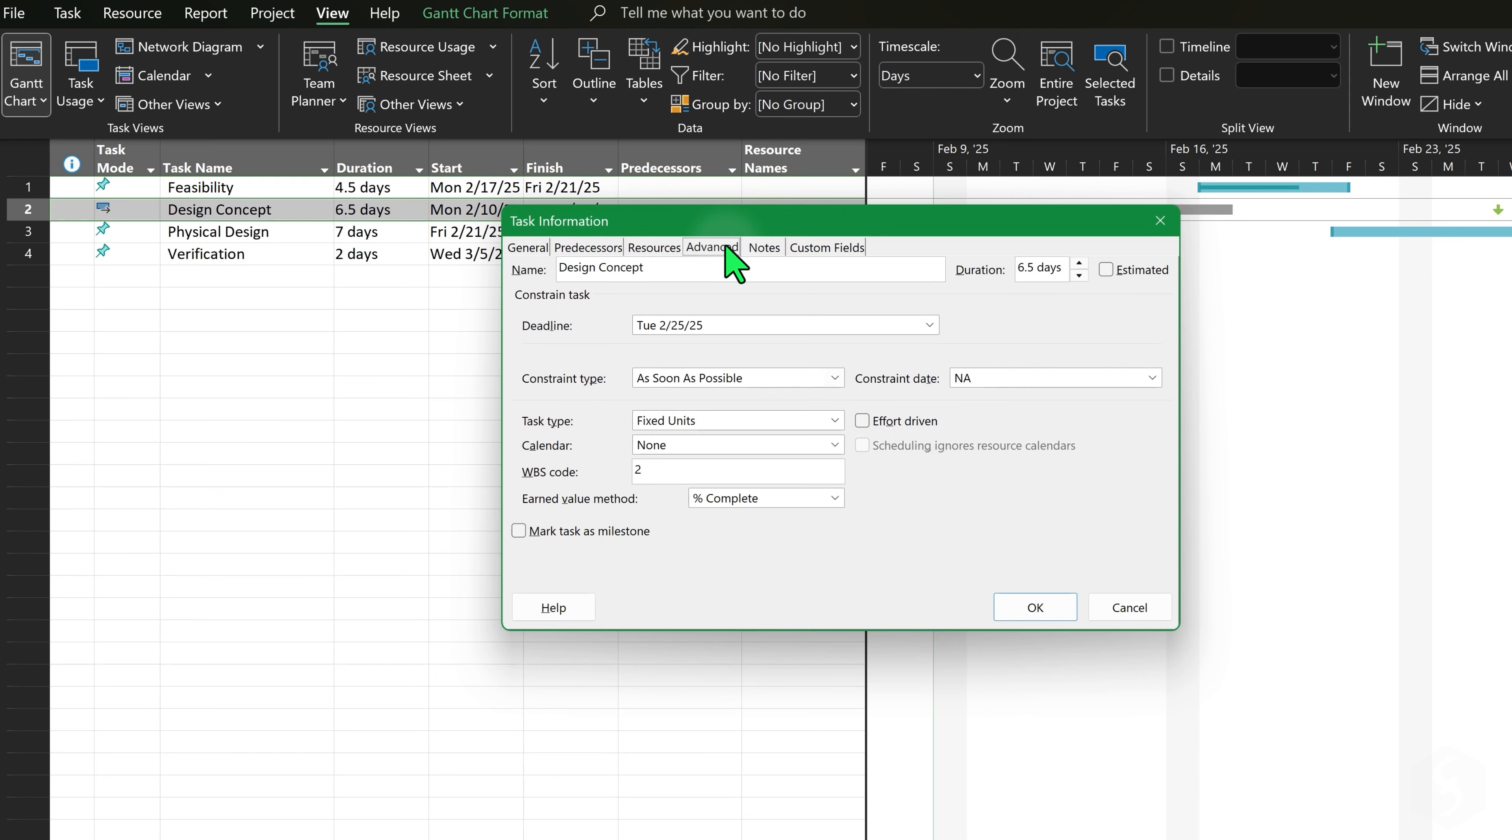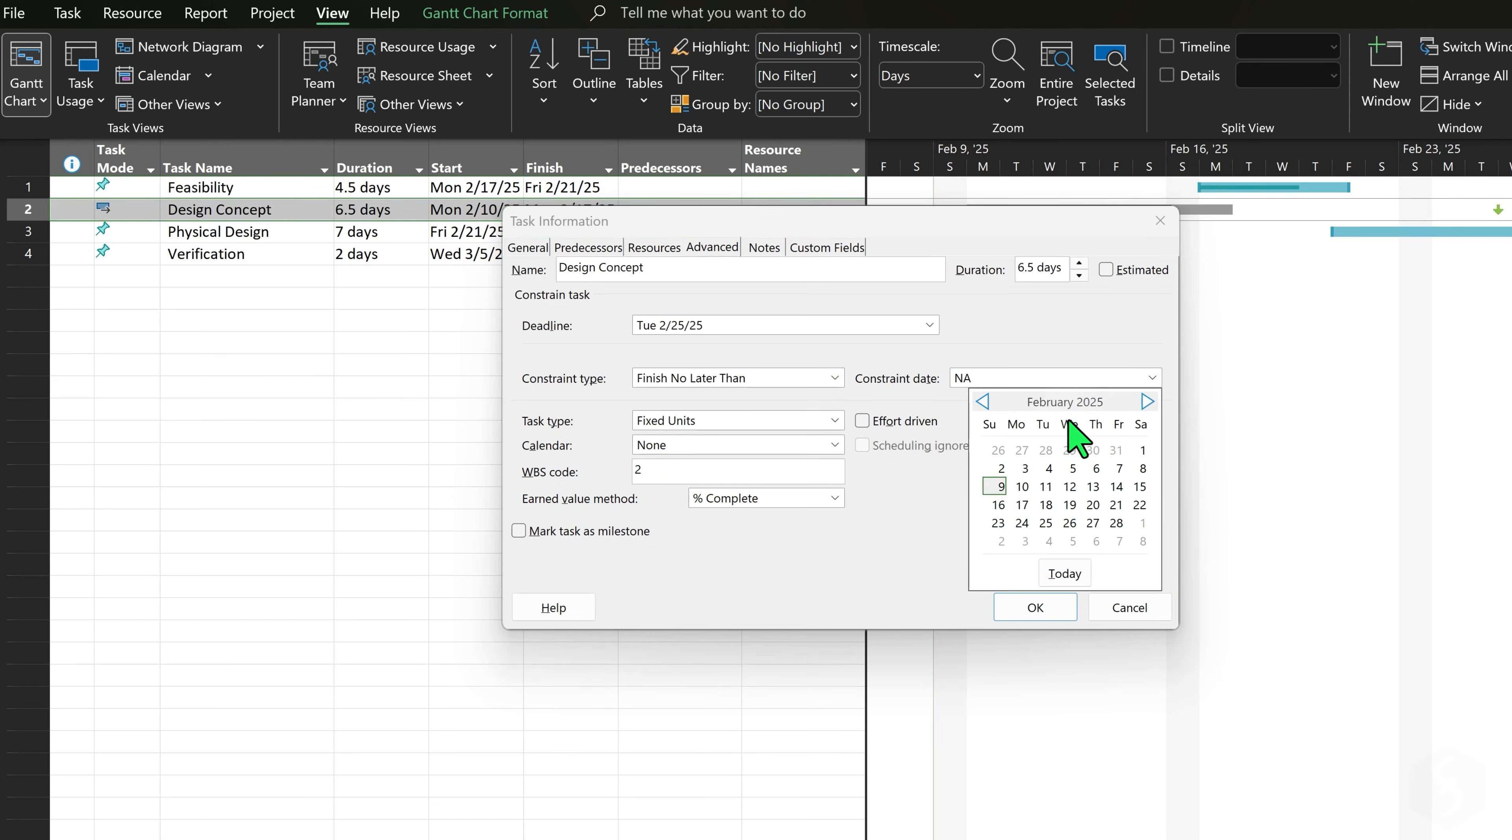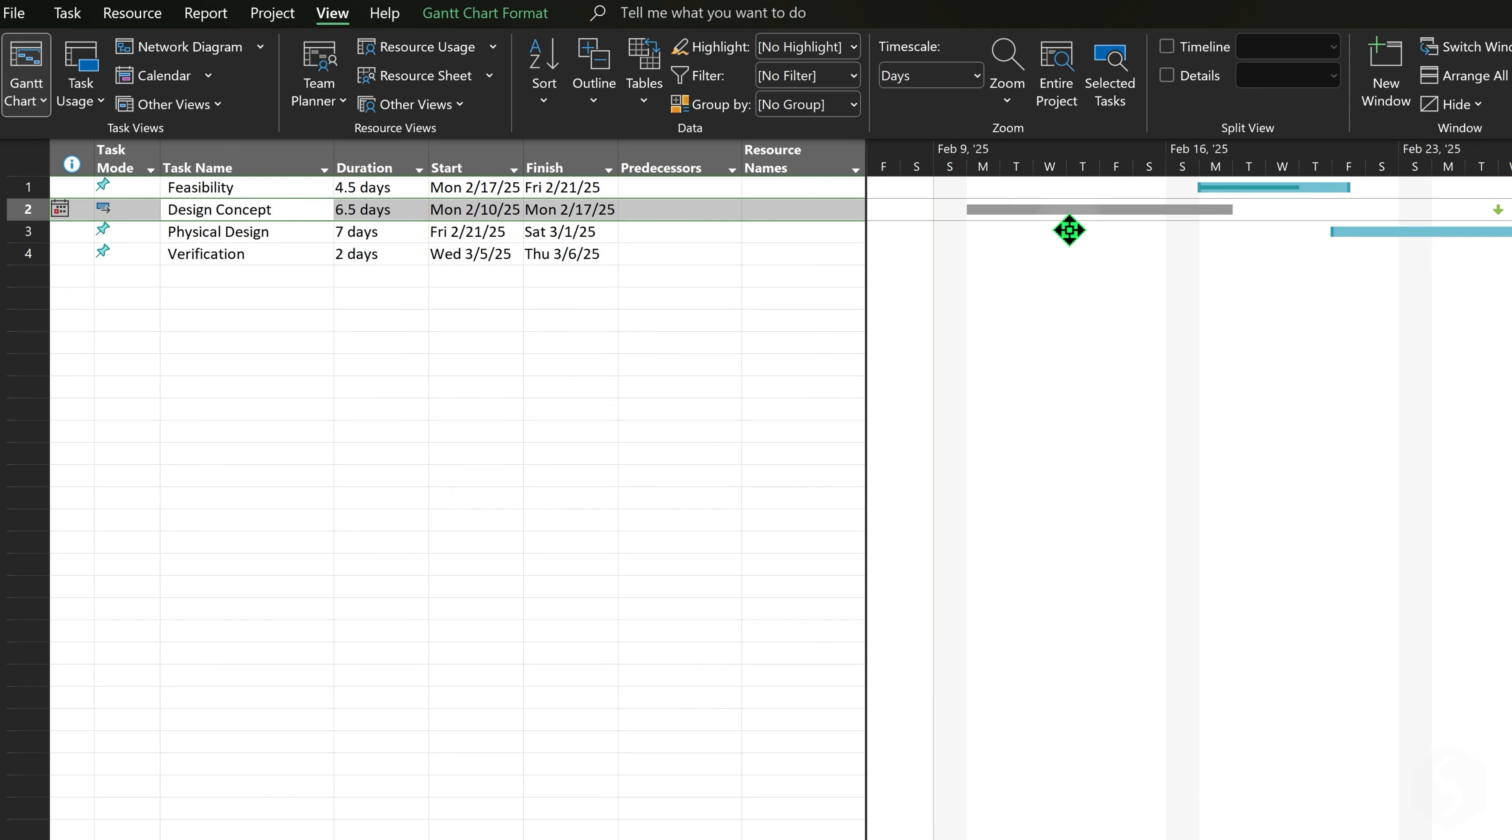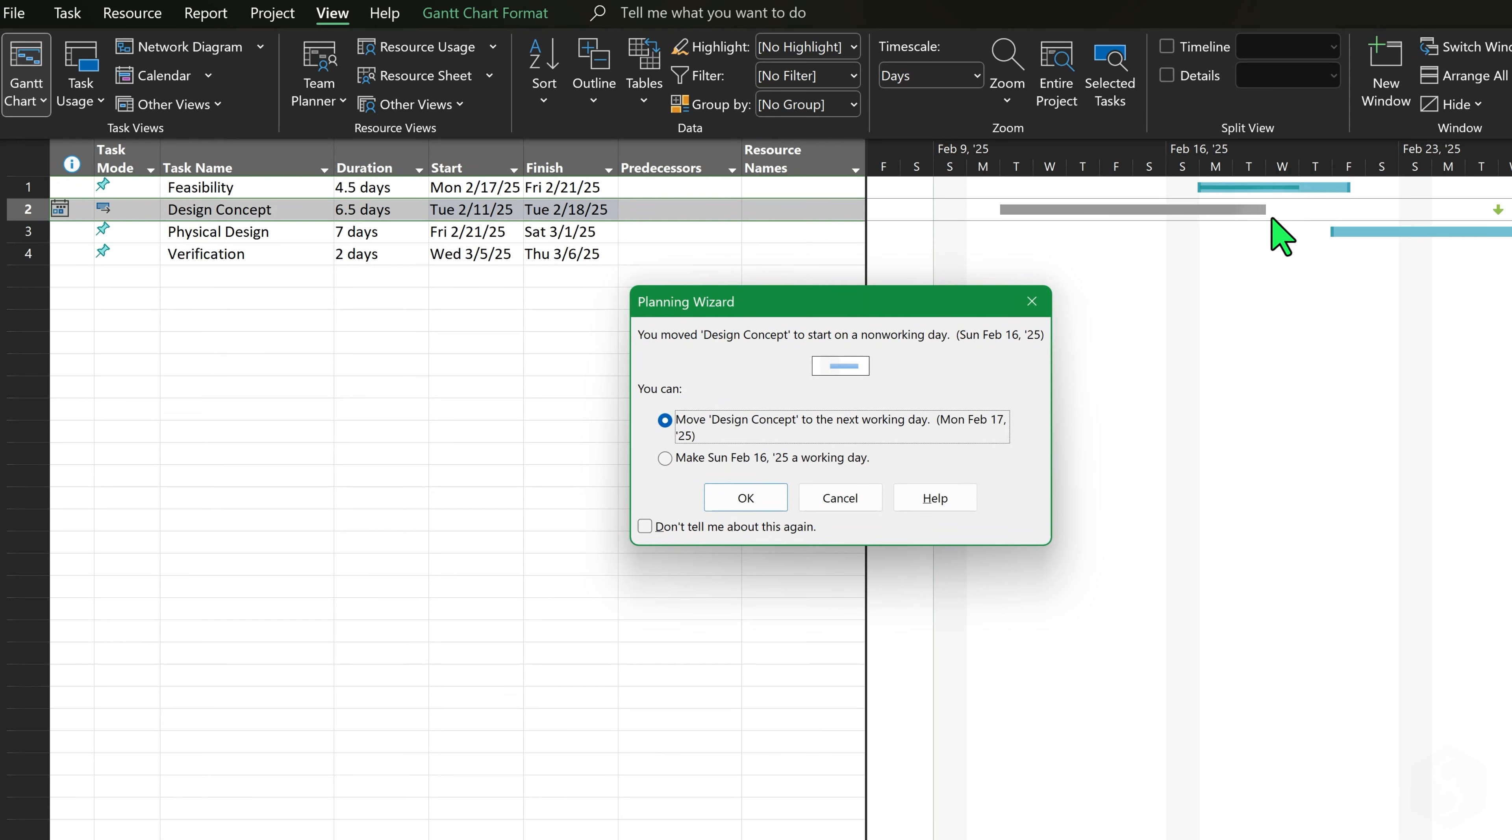For example, make the task finish as soon as possible or make it start later or earlier than a constraint date. You can still move and edit Auto Schedule Tasks, getting warnings if you violate the constraints and also suggestions on how to resolve them.